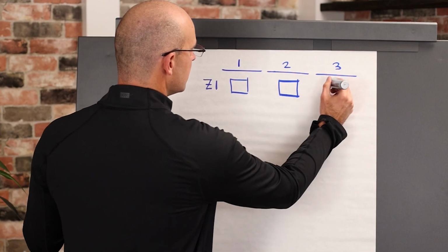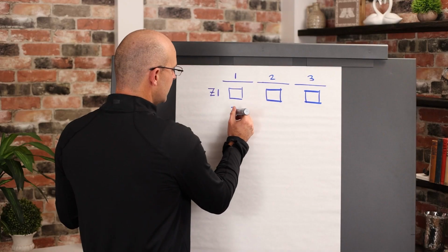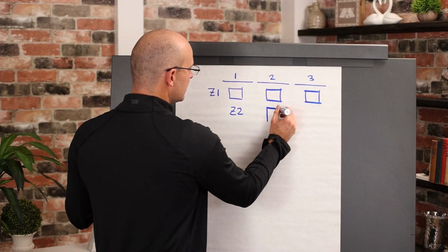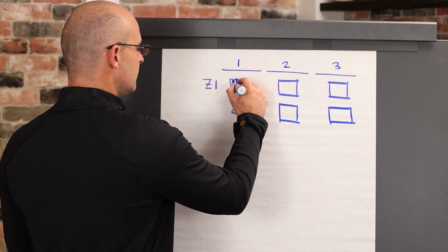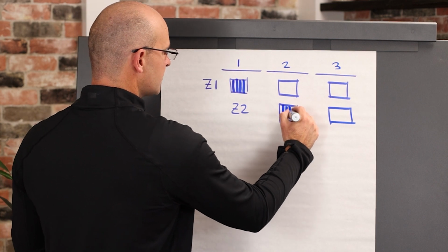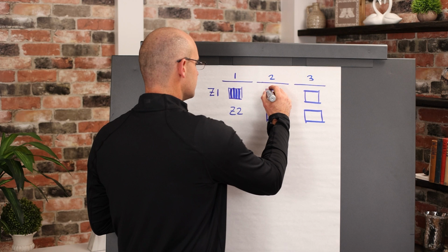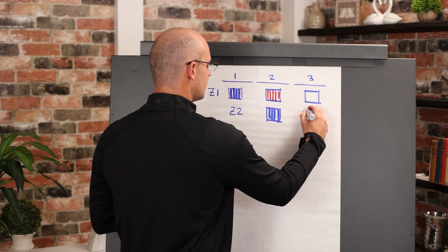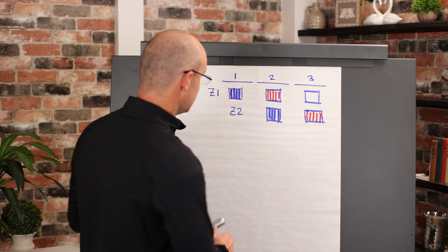So in zone 1, you'll have a takt wagon in each one of those takt times, and then when you get to zone 2, you'll have the same takt wagons, but they're repeated. So if this was a blue takt wagon, the first one for a specific trade, that would repeat. If this one over here was a different trade represented by red, that would repeat, and you'd be able to show it progressing diagonally down the page.